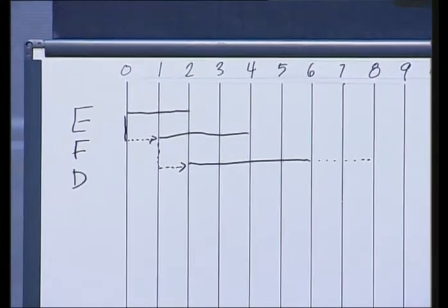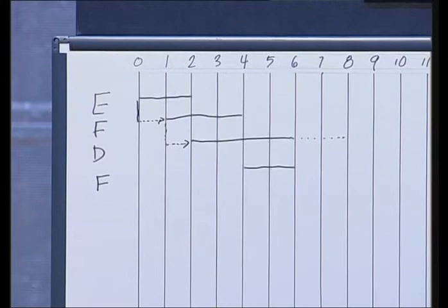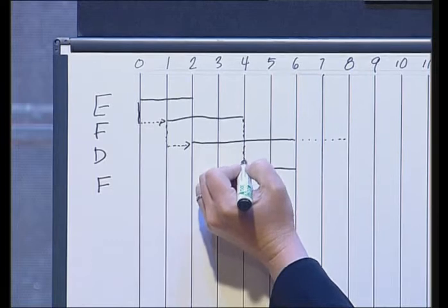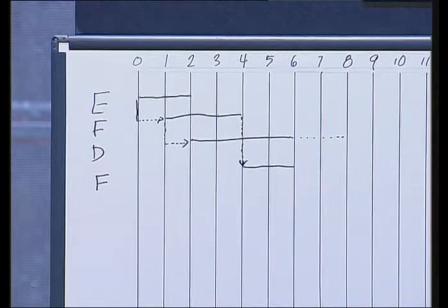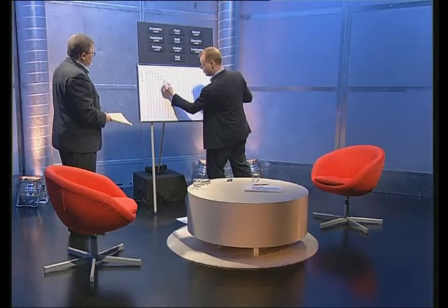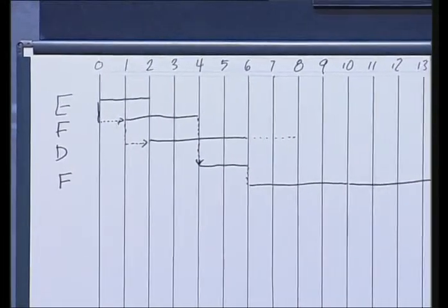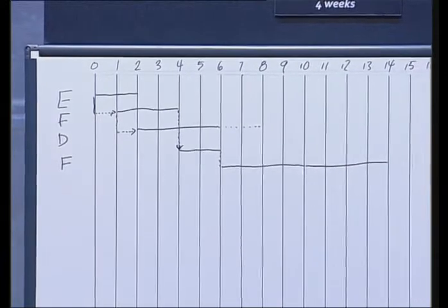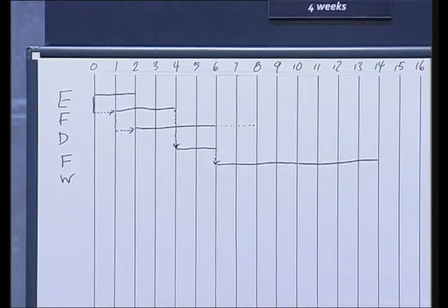We can then do the floors, and I can probably start the floors right after I've done the foundations, and that's probably what we would call a finish to start activity. We would then, right after the floors, go straight to the walls, where we have 8 weeks. Now, I might do that in 2 lifts, but in this case, we'll go for 1 straight 8-week duration. We can bring in the bricklayers and they can build this house right up to the top. So that's the walls depicted, again, on a finish to start activity from the floors.